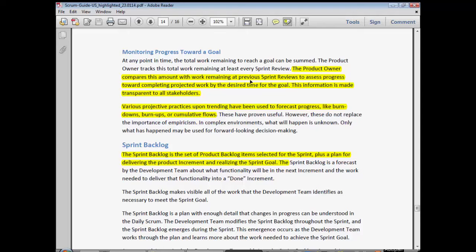Various project practices upon trending have been used to forecast progress, like burndowns, burnups, or cumulative flows. A burnup, for example, shows how much progress you're making instead of burning down — you start off with an amount of work and steadily burn it down by getting it done. A burnup just shows it the other way around, accumulating to show how much work you've done.